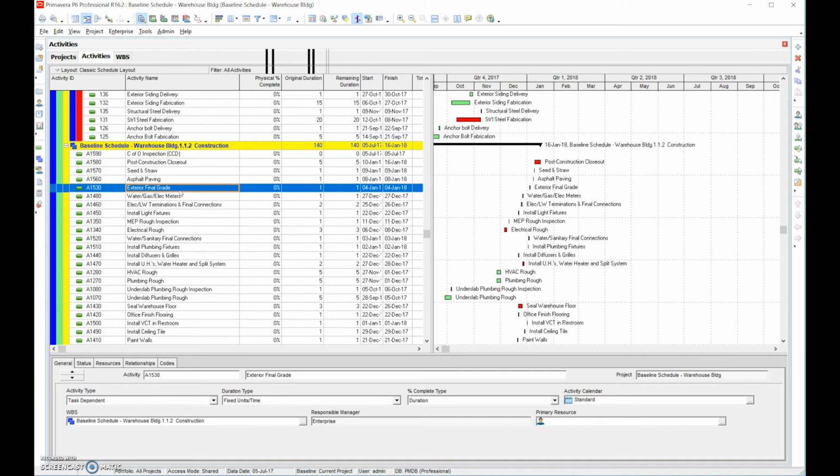We don't want everything to be 20 days, but we don't want everything to be 1 day. If every task you have is between 1 to 3 days, then your schedule is probably overly detailed. So most activities should be between 2 and 12.